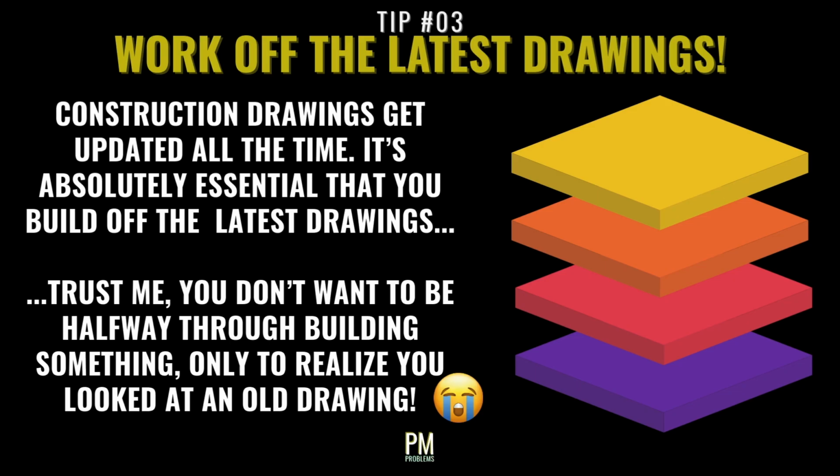Construction drawings get updated all the time, and believe me, you don't want to get halfway through building something only to find out that you were looking at an old drawing. I've definitely brushed up against this situation before, and it's 1 out of 10, would not recommend. And like we've said already, referring to the revisions and changes table on each drawing is key to make sure that you're looking at the latest set.